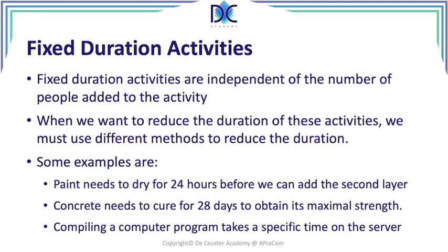Concrete needs to cure for 28 days to obtain its maximal strength. Now, what people can do, you can put some additives there so that it cures faster, or you can test after 7 days to see if you can continue with the work. Even when the maximum strength is not reached yet, it can be enough to keep on working, or it can be enough for the structure. But typically, we know that it takes 28 days to get the maximum strength.